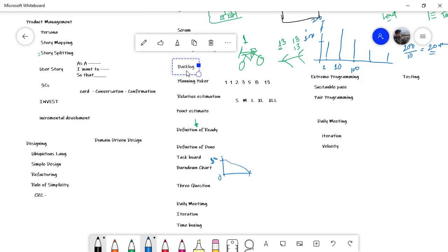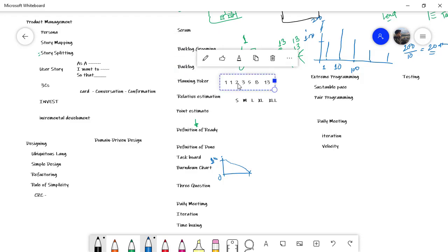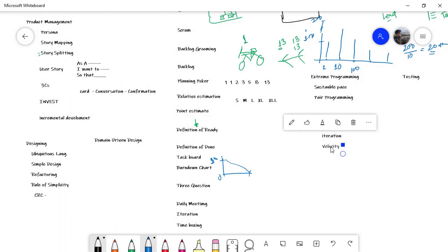All right, if for some reason you could not finish one of those stories, you are not going to get points for that. So in a team of five with 5 stories of 2 points each, if one person is not able to finish his story, then we are not going to count the points, and that iteration's velocity is going to be 8.